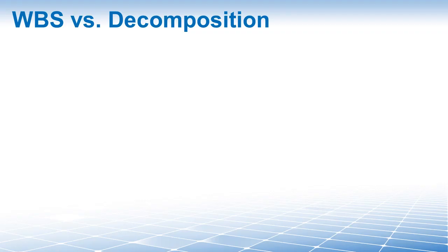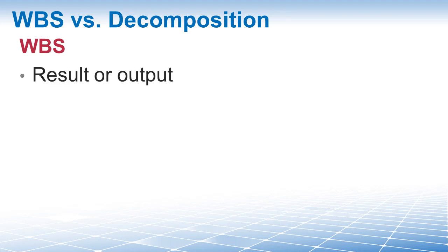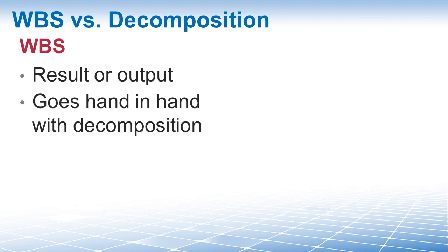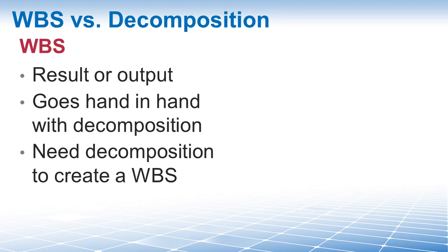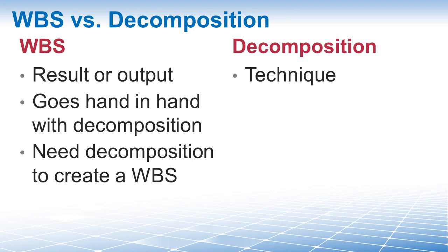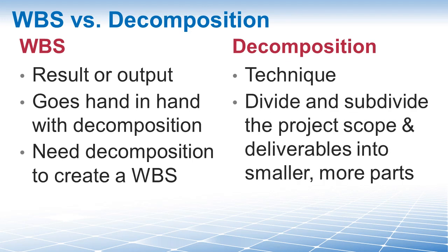One question I received from a student: what is the difference between the work breakdown structure and decomposition? The answer is actually quite simple. The WBS is a result — it is an output of the Create WBS process where you apply decomposition as the tool. Decomposition and the WBS go hand in hand because you need to perform decomposition in order to create a WBS. Decomposition is a technique — we use it to break down the work into smaller, more manageable components, and then we document the result as a WBS.